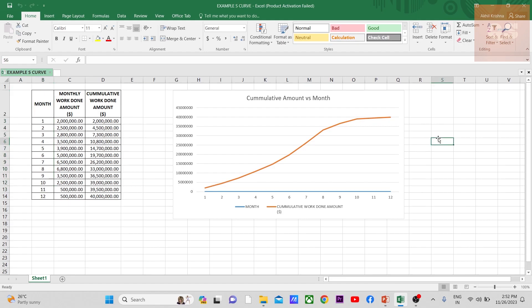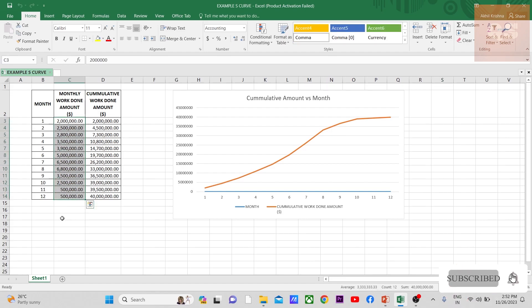That is how the cash flow and S-curve is related to each other. Now when the project actually starts, this is just the estimated one. We will be making as per the actual and we will be plotting it against the estimated one.